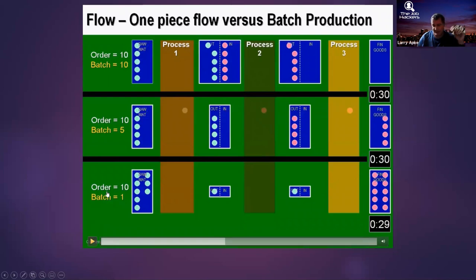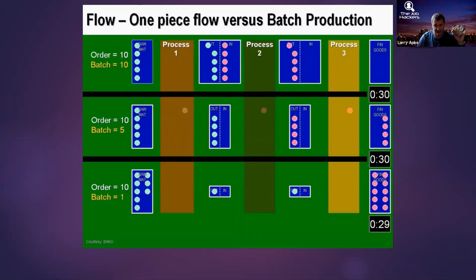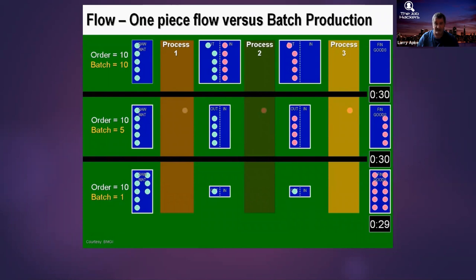Here's the counterintuitive part: I kind of understand that if I'm only moving one piece through, that one piece will move through sooner. But I have a whole payload of 10 items — what happens? In the one-piece flow condition, I've actually delivered all 10 of those items just by changing the batch size. It's almost magical.